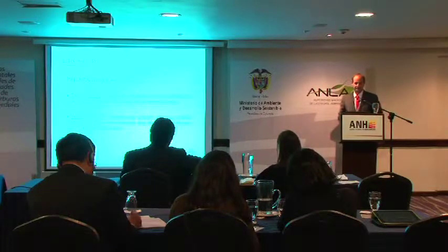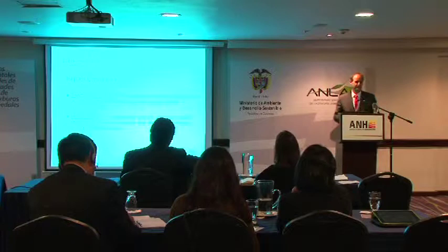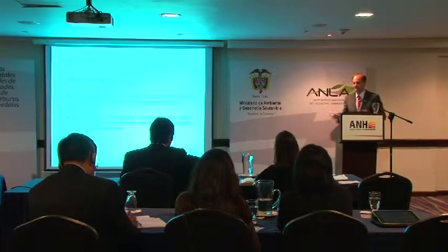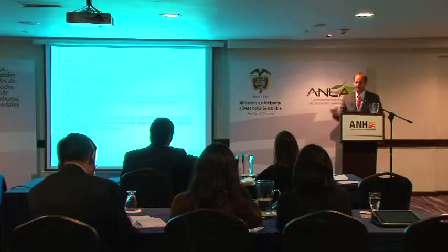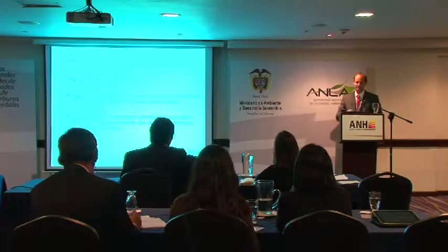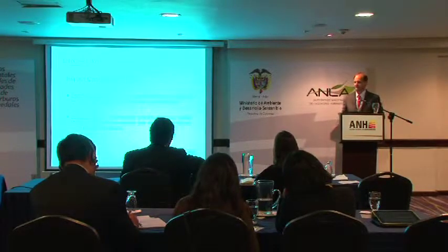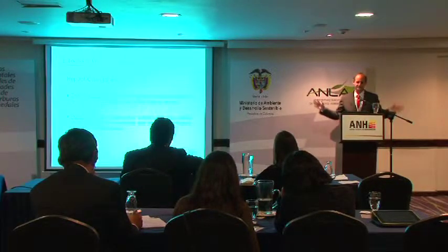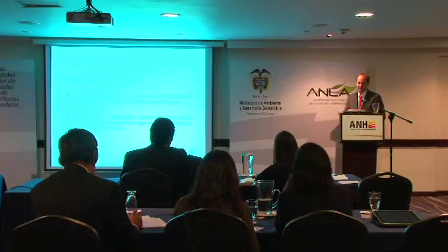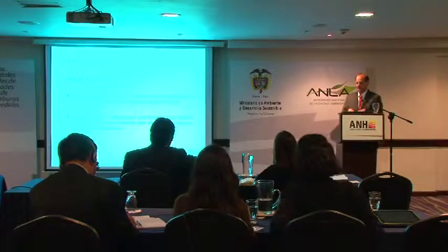Direct impacts are very easy to identify, and very easy to put your arms around and say, I know what they are. Because I know what the project is, I can have the engineers design it, and I know pretty much from the engineering design and the project layout exactly what those direct impacts are going to be. The indirect impacts are all those other impacts that occur outside of the boundary of the project that influence and affect the wetland function and the wetland services.